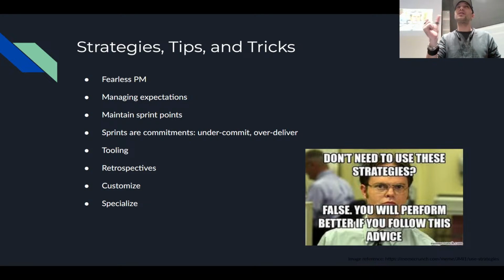And also changing the way that you word these questions of what went well, what went poorly, what should we do better. Just changing the way you say that has a big effect alone, because people think about things a little bit differently each time, and that's useful. And also, track the stuff that you talk about in retrospectives. So if you say, hey, we need to start recording a definition of done in every task that we define, start tracking that. How often are we defining a definition of done? Is it actually helping us? Do people feel like things are improved when we're doing definition of done more? Are we doing definition of done more? These kinds of things. And to that end, focus on developing habits. Your retrospectives should basically be a to-do list of habits to build.